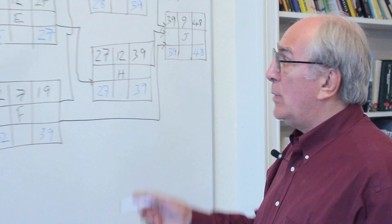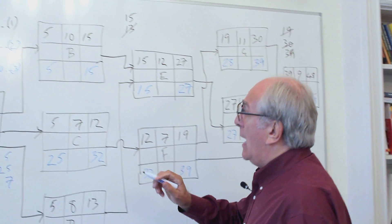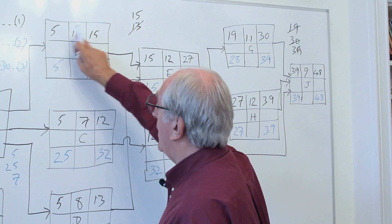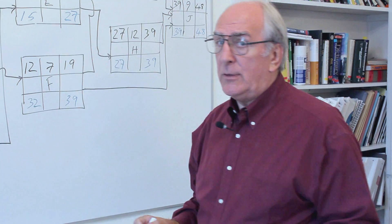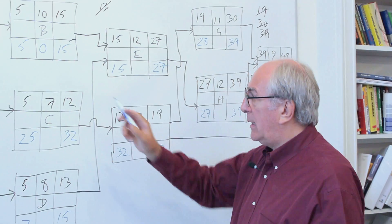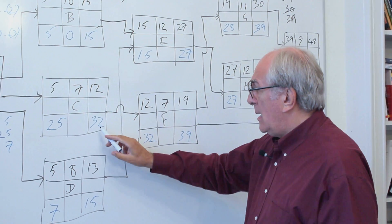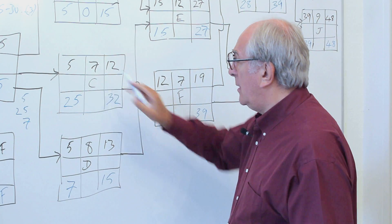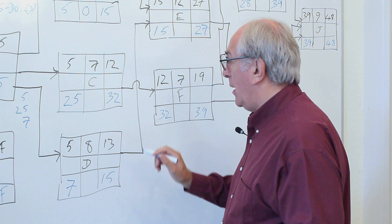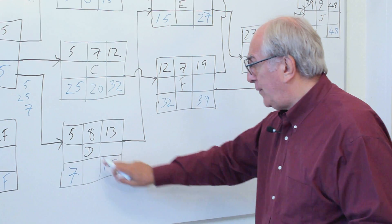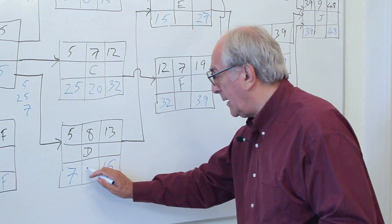So if we go and look at B, we can repeat that, and I won't go through the tedium of doing the thing again, but I'll just say it's fifteen minus five minus ten equals zero. Where it gets interesting of course is on activity C, where you can see that the application of that equation shows us the late finish minus the early start minus seven—that's five and seven—so it's minus twelve in total. It's going to give us twenty. So the total float there is twenty. If we look at activity D, it's fifteen minus five minus eight, it's going to give us two there.